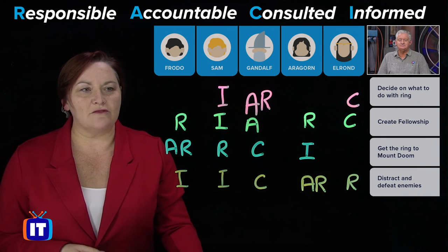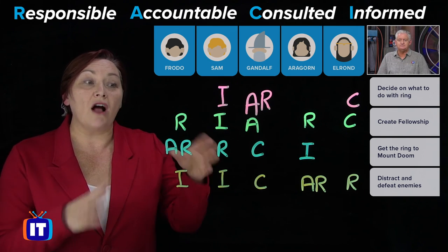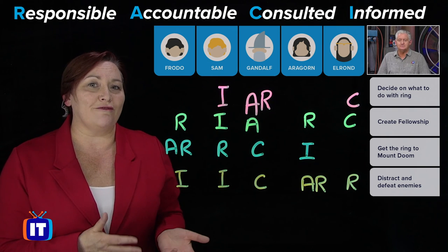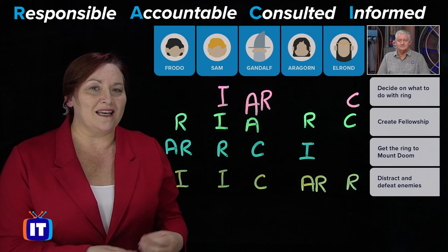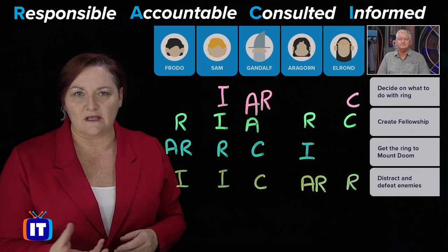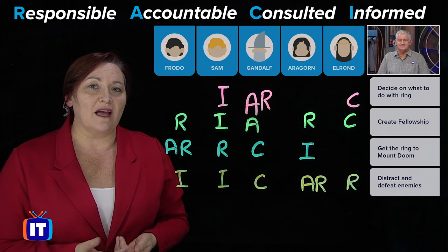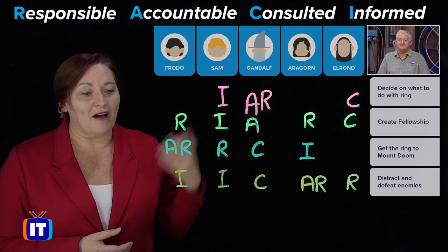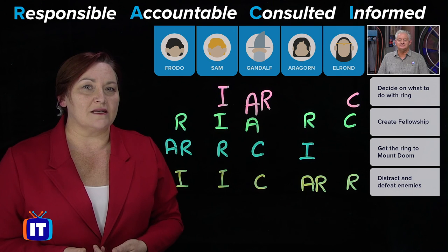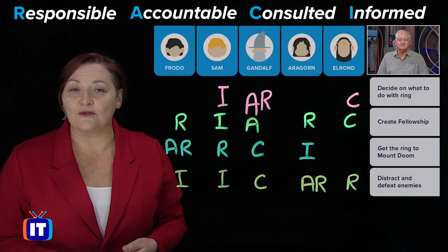So what we have in front of us now is our completed RACI matrix. One simple rule: there can only be one person accountable per line. There are gaps in this matrix and that's okay, because some stakeholders are not involved in every single activity — they may not even be informed. Also, you wouldn't expect to see consulted and informed for the same stakeholder on the same activity. In a nutshell, this is a RACI matrix, used to assign roles and responsibilities within any process or project.